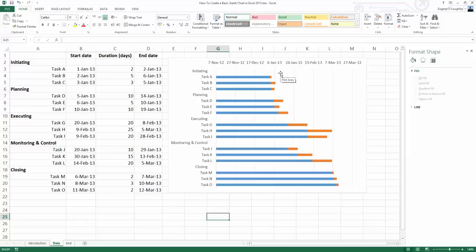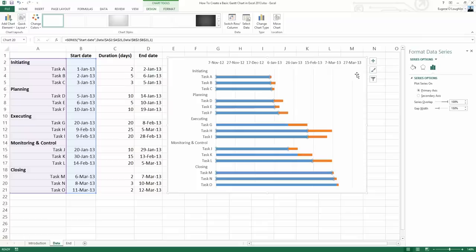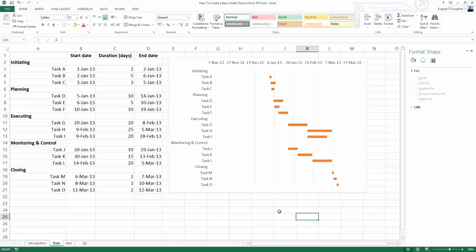The next thing we need to do is remove the blue bars. Select with your left mouse button any one of the blue bars, and over on the right-hand side in our Format Data Series window, choose the Paint Can, that's the Fill and Line option. Select that and just choose No Fill, and that will remove the blue bars. They're still there, but you can't see them because they don't have any color.